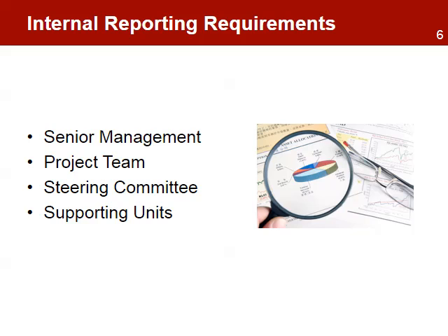Internal reporting requirements include all the internal stakeholders that are directly involved with the project. Among this group, we have the organization's management team and units that provide support to the project. The reports at this level are usually to meet internal policies and procedures of the organization. For example, a quarterly report helps inform internal stakeholders, the steering committee, and other internal units that help coordinate the work of the project. The format is usually designed to be aggregated with other project reports and provide data that is used by senior management to make decisions about the project.